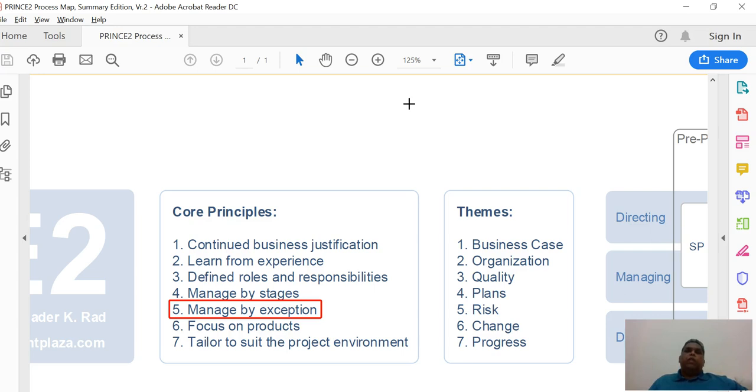Well, if at the outset the PM's authority is defined in terms of budget management or technical conflict management and so on, that would help in making sure that the PM would only approach the direction team when it goes over and above his levels of empowerment.